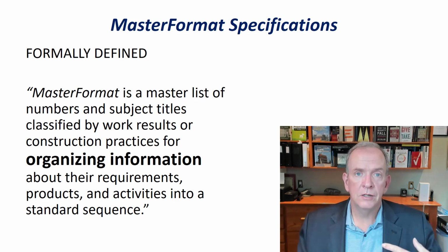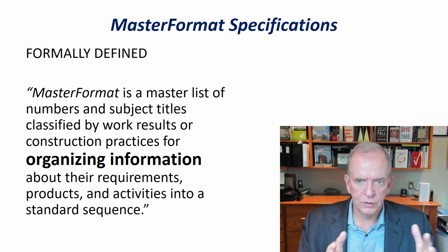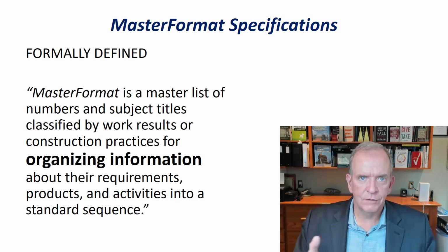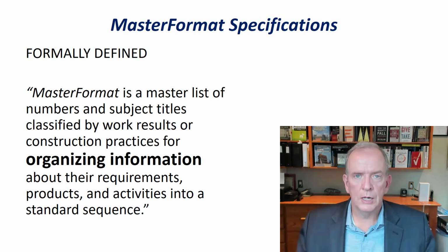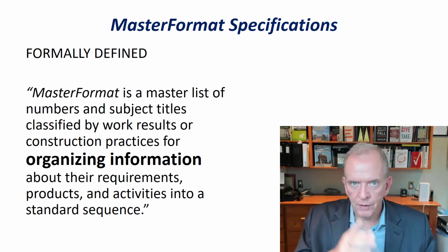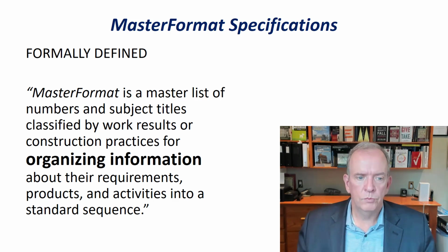It also makes it easier to integrate systems. And so when we've talked about goals and having specific goals and targets and what we want to do, backing that up, if we have systems in place, it makes it easier for us to do things. So when we're developing a work breakdown structure, when we're using cost codes for activities and we want to track costs, we can adapt and utilize things like the MasterFormat specifications to make things easier and develop a process for us. So most companies will try to do that and institute that.